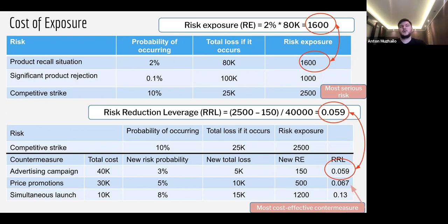and we're thinking, okay, should we do the performance testing? Should we do good performance testing here? What is good performance testing? Let's say we have to buy some performance testing tool. For example, a decent performance testing tool will cost you $15,000 per year, and including the resources, planning, etc., it may cost you like $80,000. So why should you even bother with doing the performance testing if you will lose only 50K?